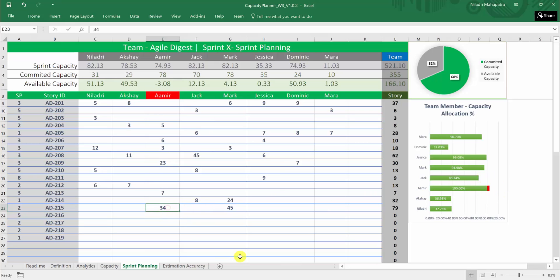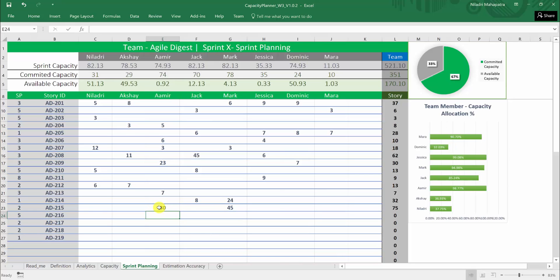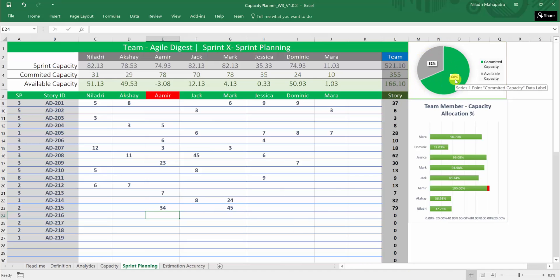So whenever you will be seeing that someone is having more than whatever the capacity is is allocated or committed it will be turned as red to give you an input and this is again here this one is showing red and in this graph also it says how much over allocation is there. So instead of 34 if you enter something like 70 hours this red portion will be again increased that is too much of over allocation. If it is just let us say 30 it is very minimal 30 is actually not more if I make it 34 maybe it will hit a little more and this area is showing total team capacity utilization. So this is how you will be allocating your stories when you are committing during your sprint planning your task hours will come here along with the story ids and it will map up with your capacity what you have planned.